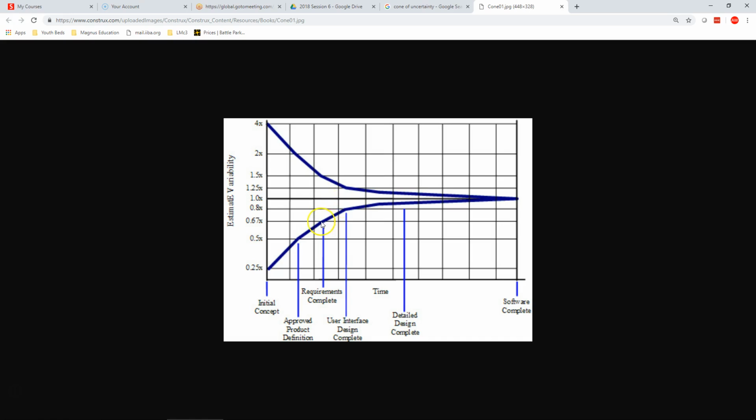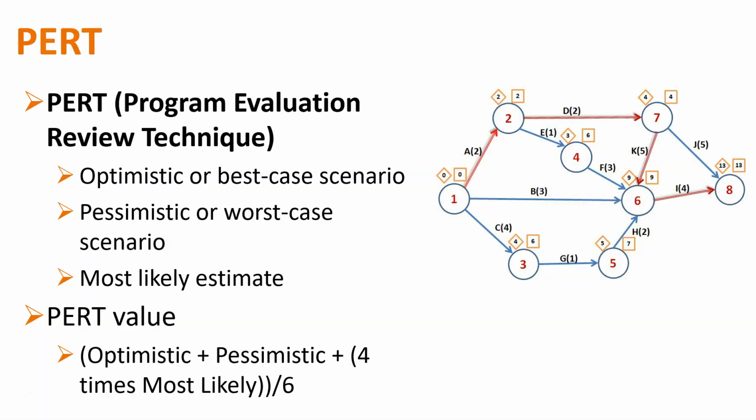It's going to take 9 months to a year and a half once I'm in requirements complete, instead of it's going to take 3 months to 4 years, right? So the more I know, the closer I get. I don't give an actual date until I'm into testing. When you're in testing and it's going well, then you can say, we should be able to push out in 2 weeks. Because you know all you need to know, right?